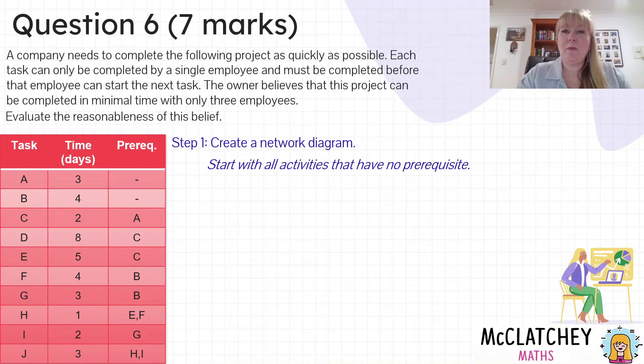A company needs to complete the following project as quickly as possible. Each task can only be completed by a single employee and must be completed before that employee can start the next task. The owner believes that this project can be completed in minimal time with only three employees. Evaluate the reasonableness of this belief.